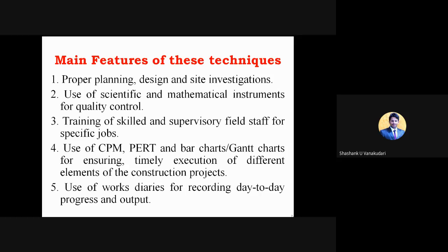The length of the bar represents the total duration of that activity. Like that, we can mention so many activities with respect to their standard starting time as well as end time. Even that bar shows which resources are required. So in a single chart, we will come to know what exactly we require to execute those activities.